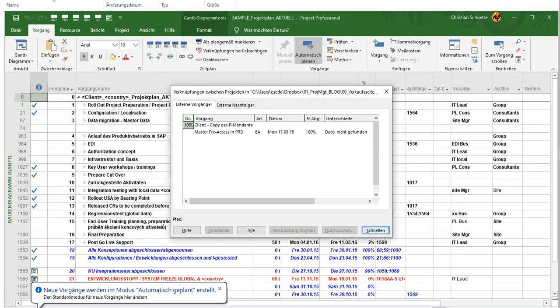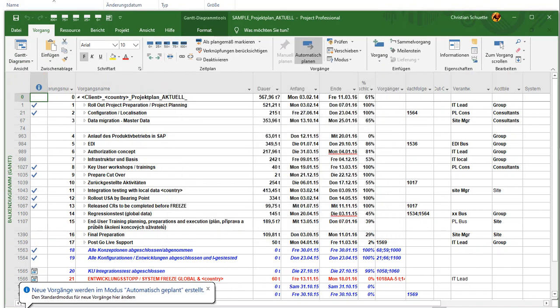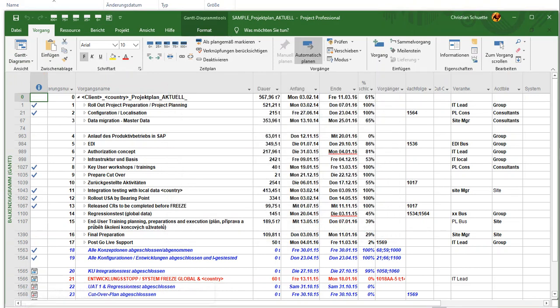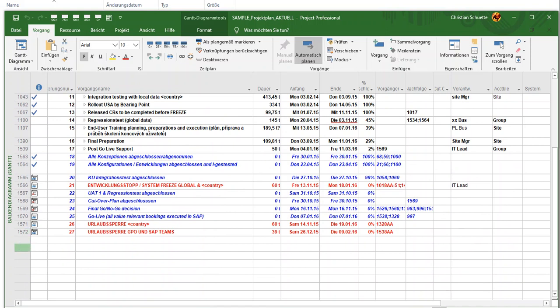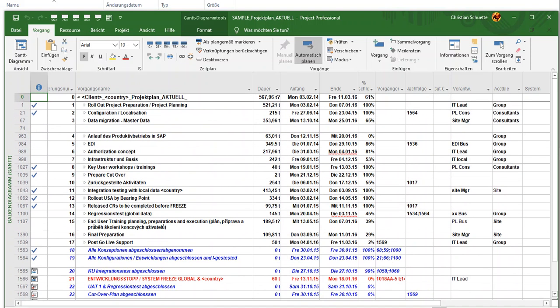So what you have here is an MS Project sample plan of about 1600 steps from a multi-site implementation, going from a non-SAP system to SAP, and you will find a lot of steps to consider in organizational preparation, as well as proven and good practice data load sequences and preparational steps.